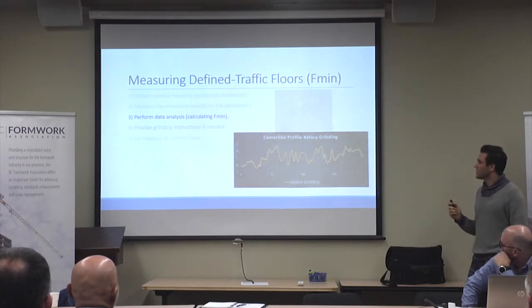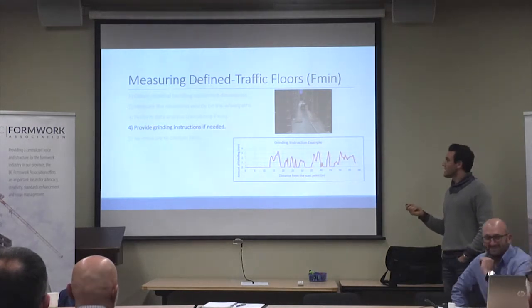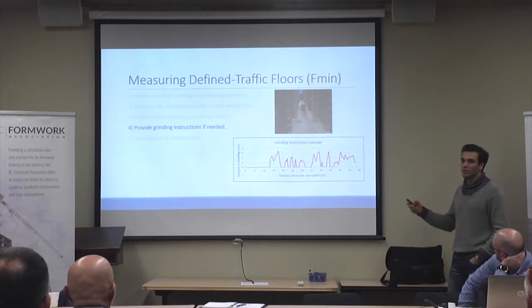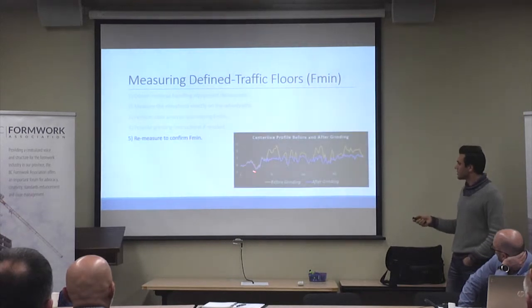Then what we do is give them grinding instructions. We tell them where to grind and by how much so that you achieve those requirements. And then after grinding, you see these blue lines.